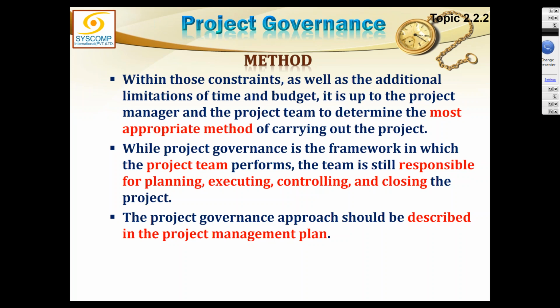and the senior management or the project sponsor and the project board would then take this document as project governance and will check the performance of the project according to those roles, responsibilities and all that which they have approved. If you have decided to divide your project in 5 phases, then they will come after every phase and they will say, okay, at the end of phase 1 you must have produced this product, show us that product, we want to check it, and if all the KPIs have been met, only then we will allow you to proceed ahead. This is a go no go decision.